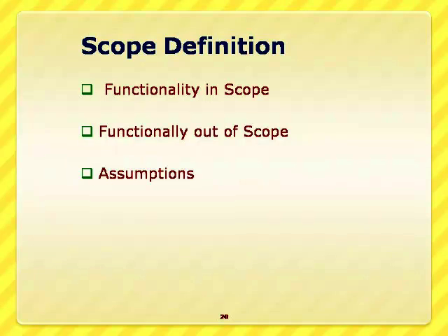Otherwise, what happens if I don't define the scope definition document? In the middle of the project, some influential top management person may come and say, I want this requirement added into the data warehouse. Then what happens? You can't say no to him. We try to introduce his requirements into the data warehouse, then the scope increases, you need to redesign it, and the project implementation gets delayed.